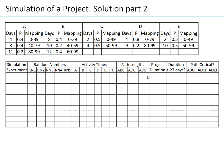For each experiment, I generate random activity times for A, B, C, D, and E, compute the length of each path, and determine project duration as the maximum path length. I also check whether the project exceeds 27 days — our threshold, possibly what we promised the customer — and record which path is critical using a 0/1 indicator.